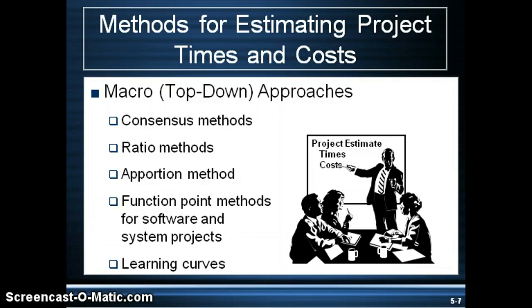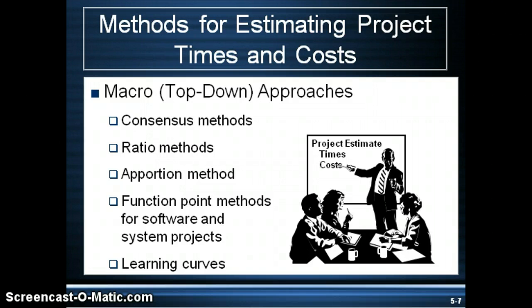The next method is the ratio method, also called parametric estimating. This is where you utilize past data to estimate project duration and cost. For example, if it takes ten days for one crew to install a thousand feet of fence, then it should take only one day for ten crews to install a thousand feet of fence. Another example is estimating the cost of building a house — often they estimate by dollars per square foot, say a hundred dollars per square foot, so you multiply the hundred dollars by the two thousand square feet to get your number.